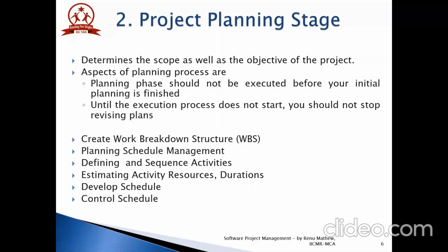Plan schedule management is a process of establishing the procedure, policies, and documentation for planning, managing, executing, and controlling the project schedule. The inputs in this activity include project management plan, project charter, enterprise environmental factors, and organizational process assets. The output of plan schedule management is the schedule management plan.